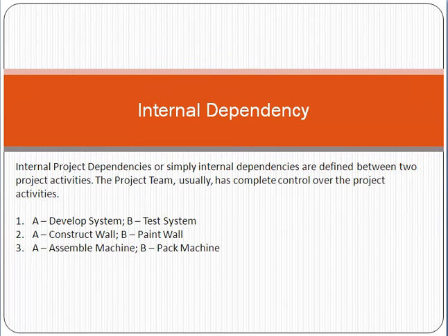then paint the wall. Once the construction of the wall is complete, then the painting will start. Assemble machine, then pack the machine. Once the assembling of the machine is complete, only then the packing of the machine will start. So friend, this is an example of internal dependency.